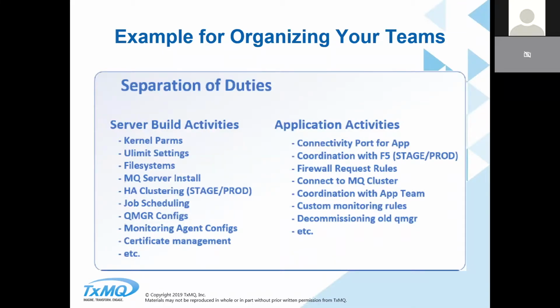So as an example, the server build team would be involved with setting the kernel params, ulimit settings, defining the file systems, doing the MQ server install, setting up any type of clustering, general MQ configs, certificate management.